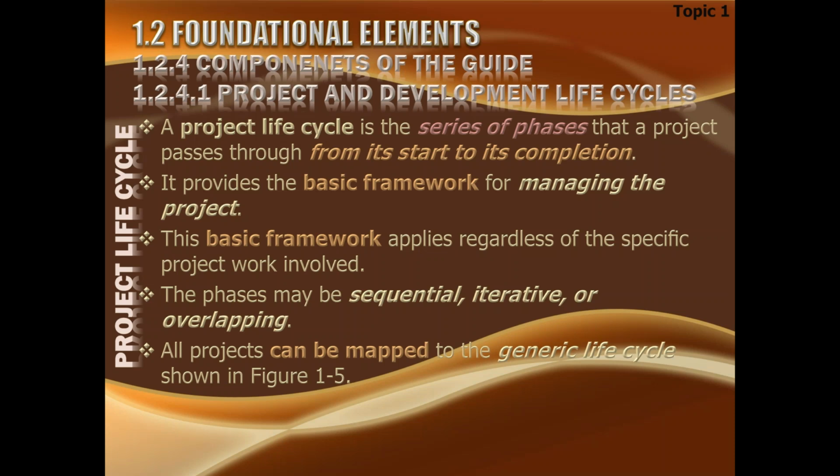Centaurus in Islamabad. This has 3 towers. So when it was being constructed, I used to look at it, and I would say this is a good project. This is a huge project, but this project has got 3 distinct sub projects. Each tower is a sub project, and all of these 3 towers could have been constructed simultaneously under the command of a separate project manager, whereas an overall big project manager is looking after the whole Centaurus thing.